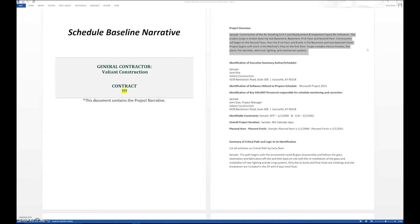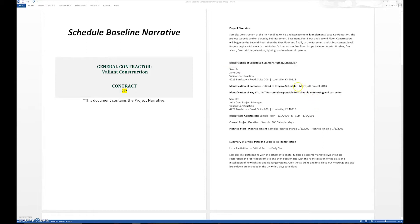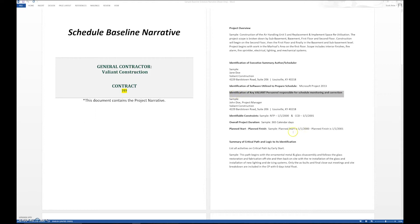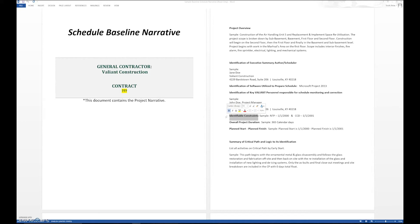You identify who was the author of the schedule, what software you're utilizing, what key people are going to be updating and responsible for the schedule. You want to identify the constraints, the NTP notice to proceed, and the contract completion date, the CCD. These have constraints—they have a start date and a finish date. We need to identify those.